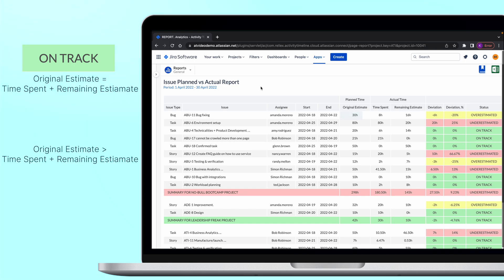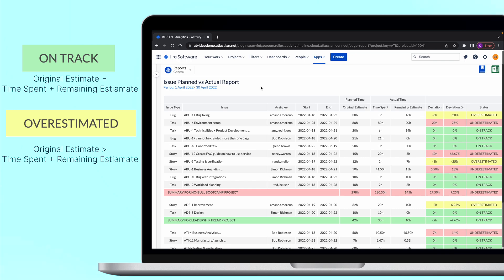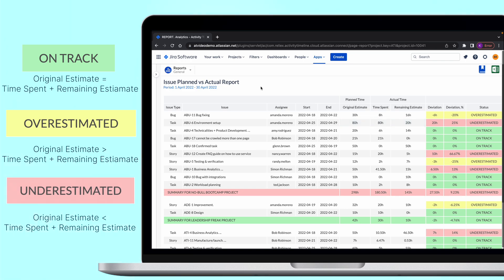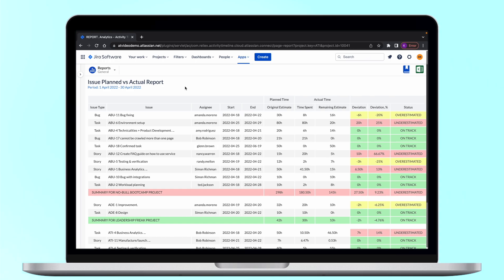In case original estimate is bigger than the time spent and time remaining it will mean that the task was overestimated initially. And vice versa if the planned time is smaller than the actual task was underestimated. The report will also show you the summary for the project as well as its deviation from the initial plan.